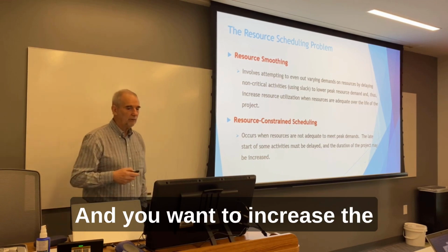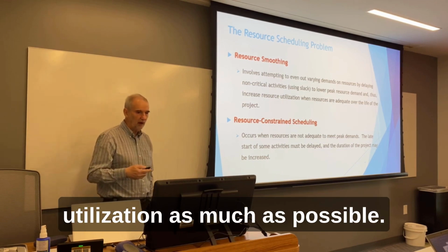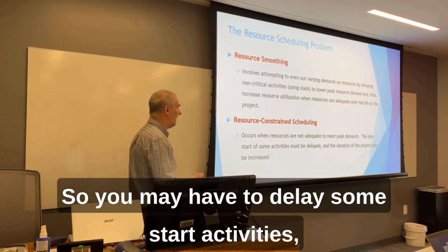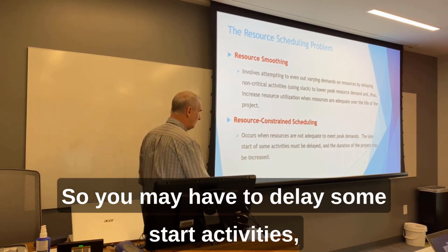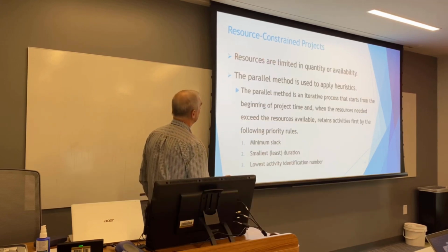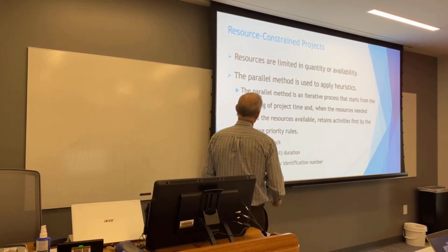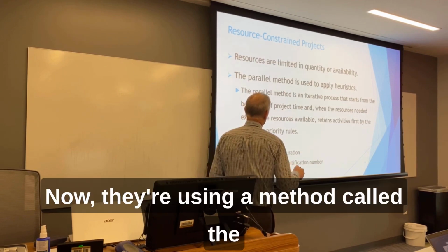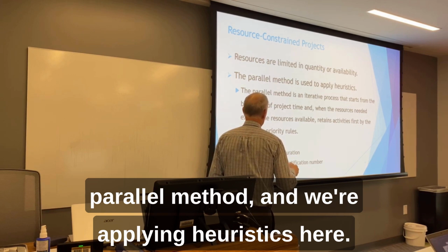And you want to increase the utilization as much as possible. So you may have to delay some start activities, and the duration is going to be increased. Now, they're using a method called the parallel method, and we're applying heuristics here.